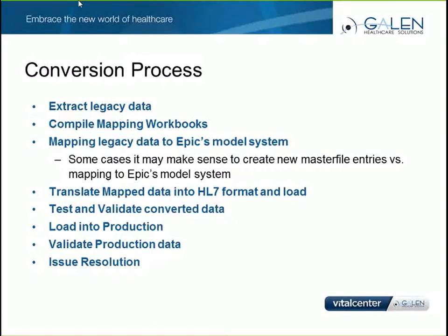We also recommend that you think about the different variations of data. As daunting as it may sound, you'll want to test each variation of the data. One way you can do this is to ask your providers to give you a handful of patients with complex charts. This may be a geriatric patient with years of data, or even a pediatric patient with specialized tests, growth charts, etc. Hopefully these patients will have diverse, complex data that will cover the many different variations of data that you will be converting.